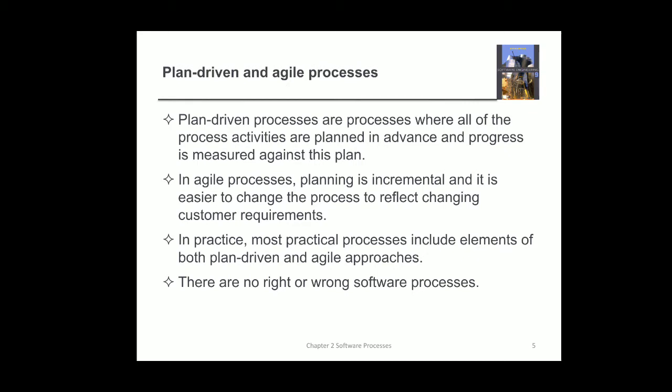If you're building a very large project, where some requirements have been collected fully, there we will apply a plan driven method, and where there is a frequent change of requirements from the customer, there we will follow the agile approach. So when we are building an application, a part of it will follow a plan driven model, and a little bit portion will be of agile approach.